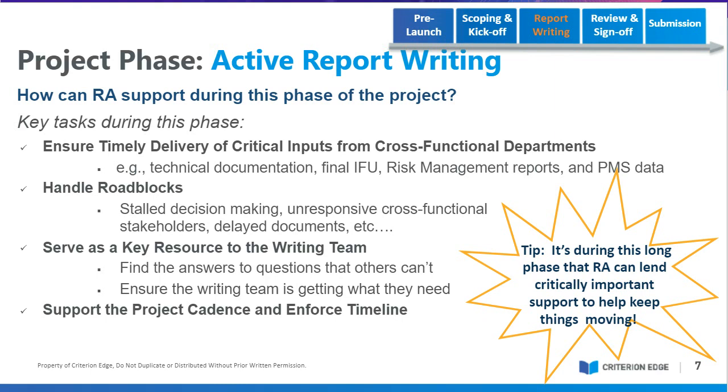Your PMS data, here's a hint for your writers. Please don't give them raw data, for example, hundreds or thousands of rows in an Excel spreadsheet. That is an enormous amount of time that the writer is going to need to take just to put that into tables. I don't think you want your writers doing that type of work when your internal PMS team could prepare tables of your PMS in a PMS report.